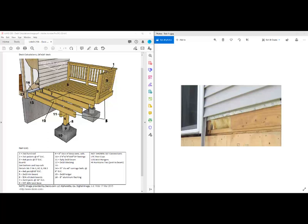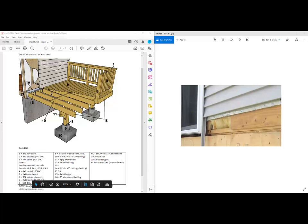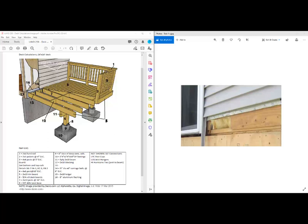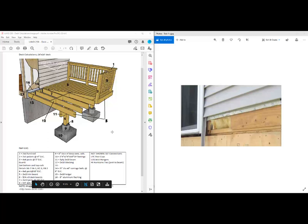The sonotube shown is truncated; it's a four foot deep sonotube. We're going to assign the tasks and the order of preferences. We're determining the predecessors - what is the order of operation to determine our scheduling and how we're going to actually construct this. All of the elements here are numbered and labeled. In order to do the critical path, we have to determine what are the first elements that need to be done and what are independent elements that can be done at any time.